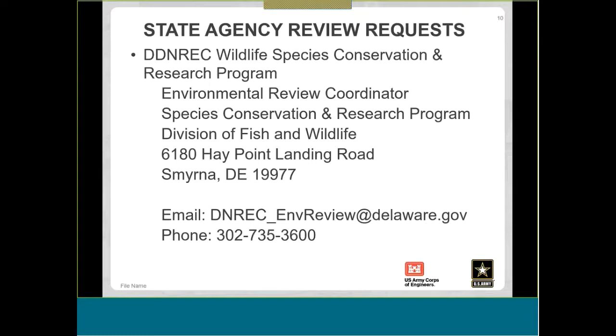The other things mentioned here would be the water quality certification and the coastal zone management consistency. Both of those have been issued for all of these permits that we're discussing today, 13, 27, and 54. But I think nationwide 13 is denied in critical resource waters only. So if you're doing a project in a critical resource water, then you may have to get individual water quality certification and CZM consistency. But in general, they are issued.